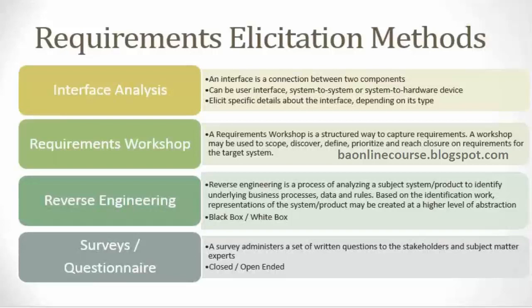Now, the context in which you would generally use a JAD session is where you already have something in place, and then you want to figure out whether some requirement can be fitted into that existing architecture or not. So there, the inputs from the technical team are required. Ideally you would conduct a JAD session wherein you want to figure out whether the requirement coming from the customer is feasible, or what the various options available to meet that are. All that could be discussed in a JAD session, right?